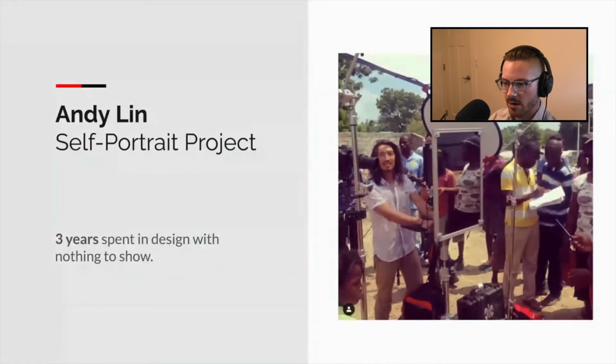There were entire flows of screens that didn't connect to other parts of the app. There was nothing about how we were going to connect to a mirror, find a mirror, control the mirror. There was just this super cool flow of what happened once we had the photos. There was not a word written about the software on the mirror, which is half the project. And so Andy came and asked for an estimate, and we had to be honest with him. We had to tell him, we can't estimate this. This isn't buildable as is.